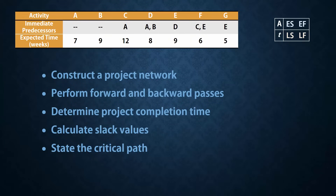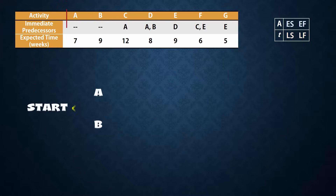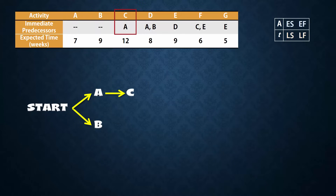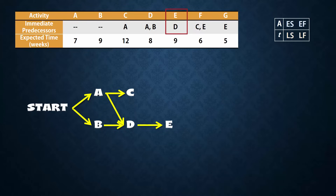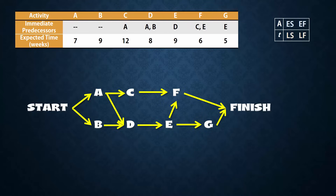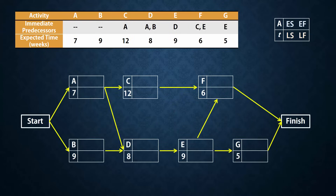I usually like to start with a sketch to make it easier when drawing the full network. Activities A and B have no predecessors, so they can begin at start. Activity C needs A to be completed before it can start. D needs both A and B completed. E needs D. F needs C and E. And G depends on E. Since F and G have no successors, they go to finish. Here is the network with the activity nodes displaying the letters and times.